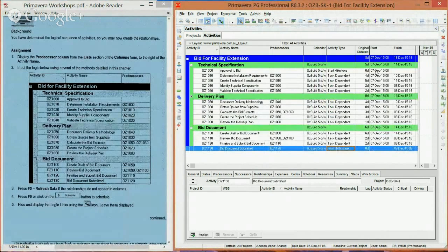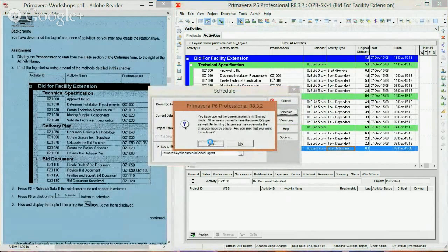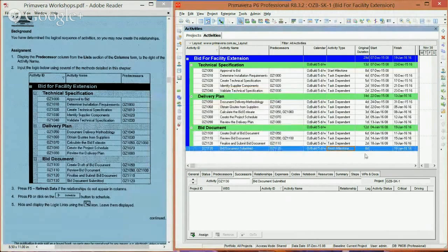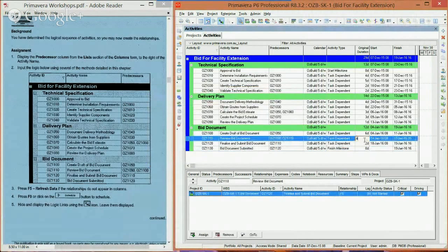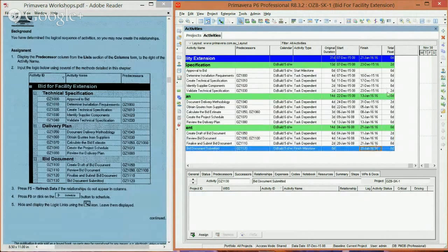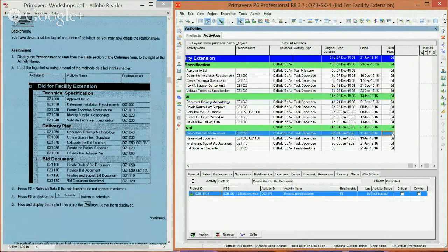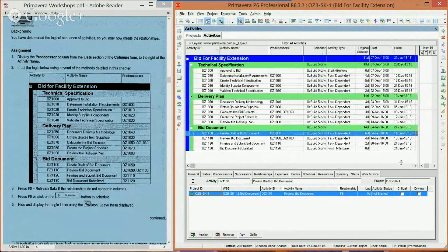And then after doing so, we're going to schedule. So F9, schedule, and you will see the changes made to our schedule. I just caught that I made a mistake and had 2 days here, whereas it should be 4. After doing so, your final finish date should be January 21st. Only these two activities, three I believe, this, and this should have float, whereas the others have 0.